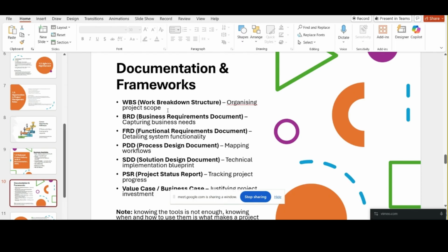So as tiny as sending an email to the clients and scheduling a requirement gathering workshop session is as critical as building the application. Those very tiny tasks and activities need to be broken down and identified, so that as you're delivering, you already have visibility as to what you want to do, and at what stage of the project you're currently at. You already have visibility as to what you want to do per stage. Very, very important.